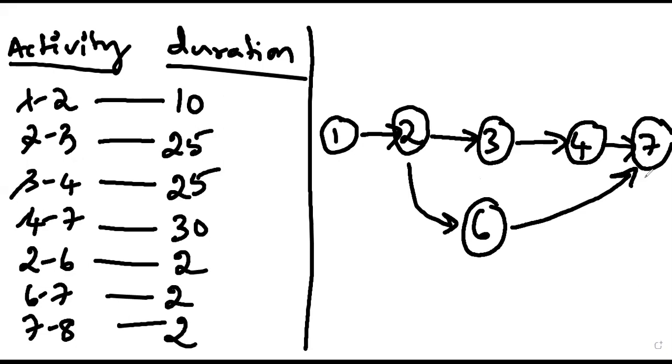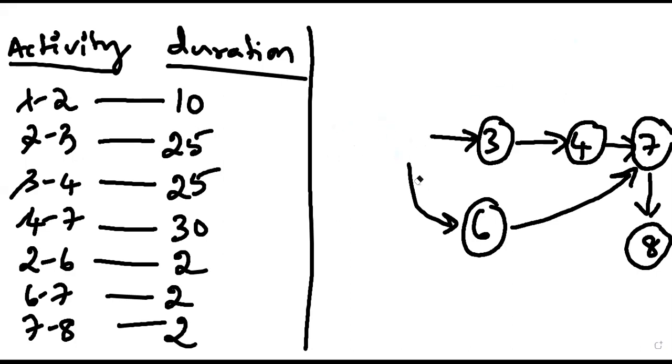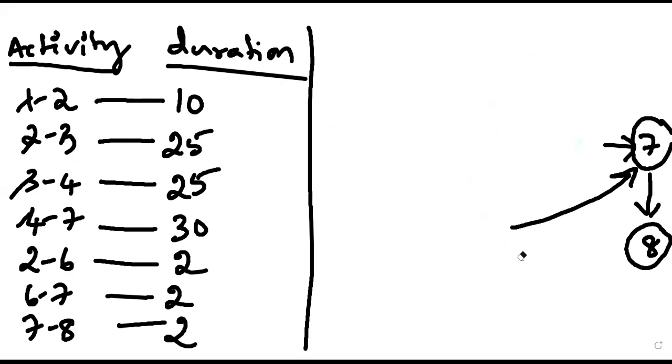I do not have space, so I'm writing this way, but actually this is not allowed. We are supposed to draw from left to right; the arrow should be from left to right. Otherwise, I will draw it separately in the next scene. That would be ideal.